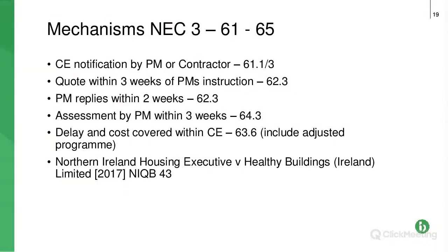Don't mess about. Don't risk being out of time, because, as I said earlier, these are conditions precedent. If you don't notify properly, so within the timescale and with the right information, then there is a real risk that you won't get your extra time or your extra money. It might seem unfair, but that is the position, I'm afraid.